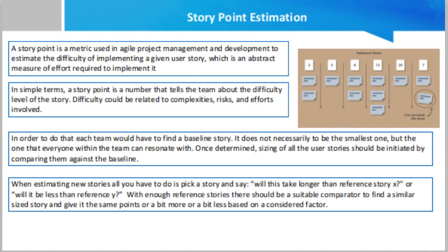Hold a round of planning poker. Planning poker helps a team gain a consensus of correct story point approximation for each item. Like in a sprint planning meeting, each developer and tester receives a set of cards, each one depicting a number of a Fibonacci sequence. A backlog item is brought to the table so that the team may ask questions and clarify features.